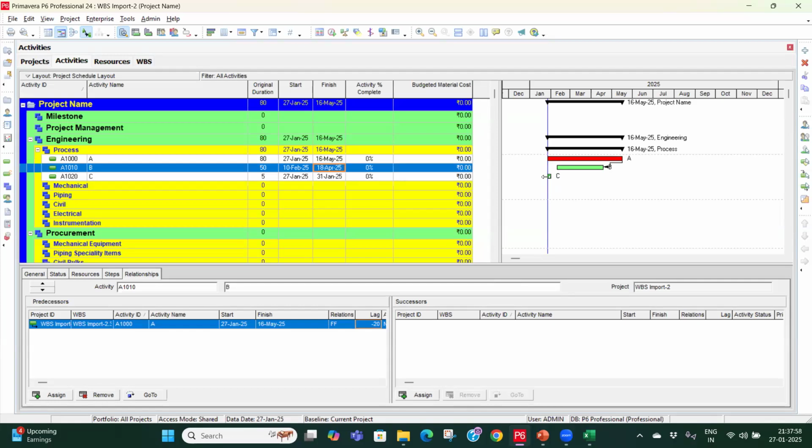Okay, why it is not recommended? Because as per the DCMA 14 point, I will explain that during the schedule quality check. It is one of the points to avoid negative lag. Even positive lag should also be avoided. It should be, let's say, 5% of your activities that have lags. So there are certain parameters, which we'll be discussing in DCMA 14 point, maybe tomorrow or day after tomorrow.